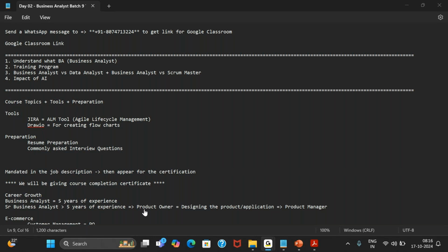So as a BA, what we try to do is plan for the next one month in advance. Maybe talk to stakeholders, see how the pipeline looks. If the pipeline is strong, build the user stories or requirements for the next one month. Okay? So that while my team is fully occupied in the month of October, I am working on identifying requirements for November. That way, they are not sitting idle. Usually dev managers will point at you when they see that their team is sitting idle, that they don't have any story to work on. So don't work on a sprint-by-sprint basis, rather work on a month-after-month basis.